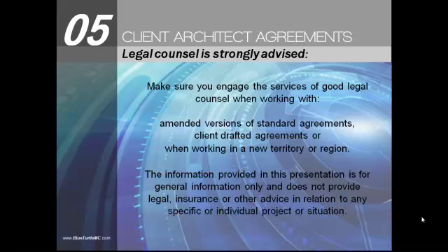For example, about 10 years ago, I was working as a project manager for a builder in the United States, and during that time I was involved in writing and managing subcontractor agreements. Now, paid when paid and paid if paid contractual clauses were fairly common tools used by builders at that time, and possibly still are. For those of you not familiar with this clause, a paid when paid clause basically states that if the builder is not paid by the owner, the builder has no obligation to pay its subcontractors. So as a builder, it's quite a desirable clause to have.